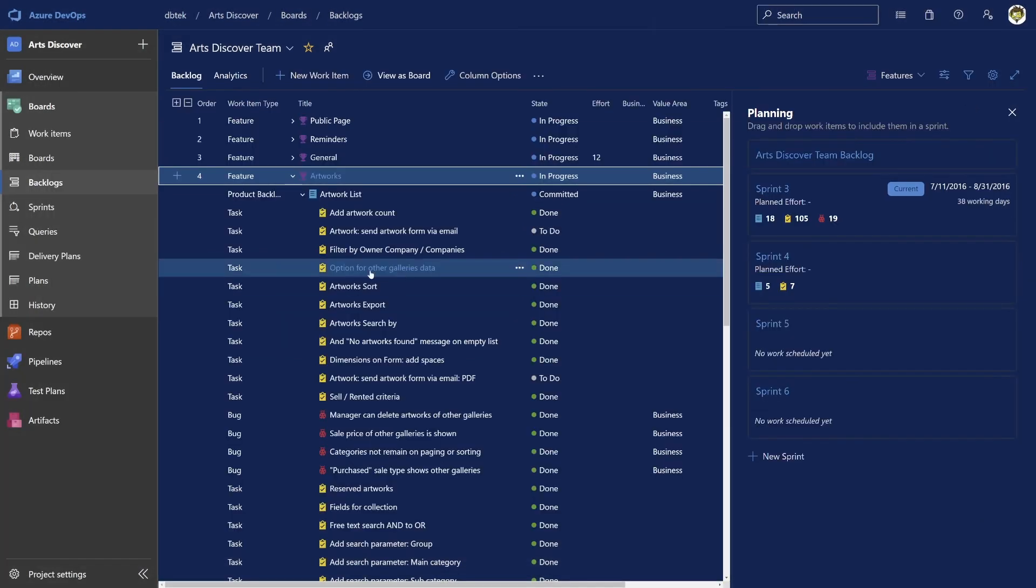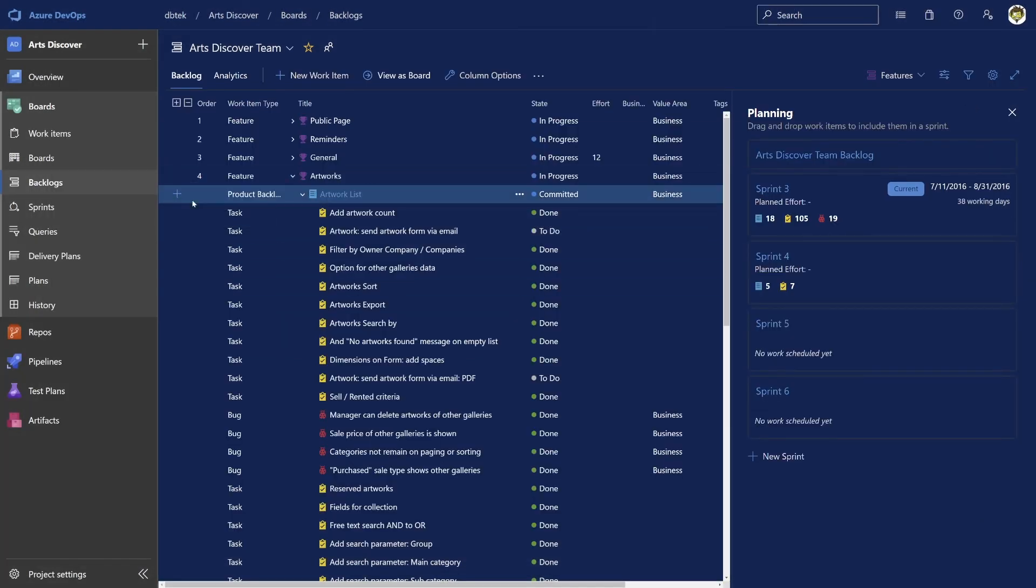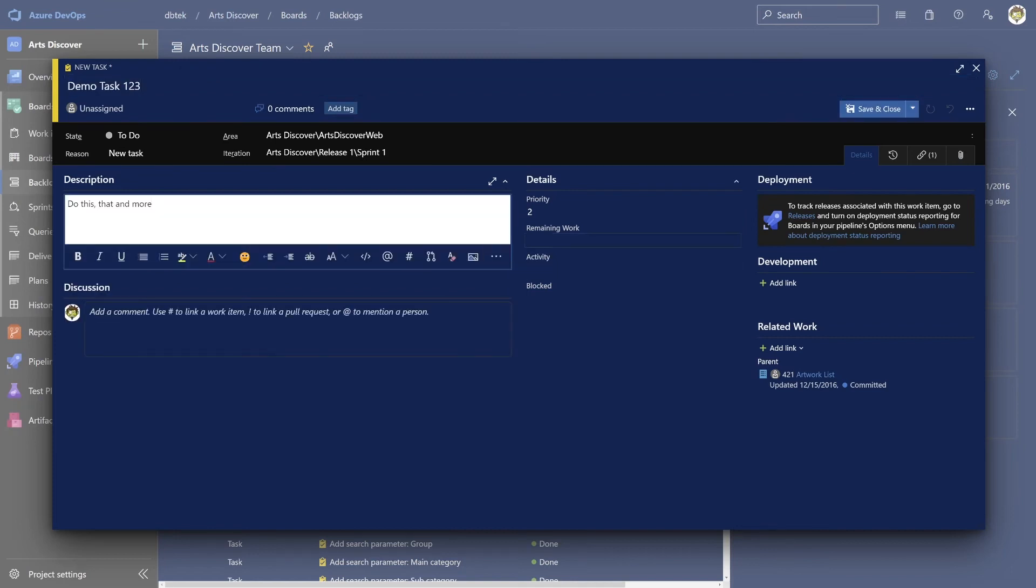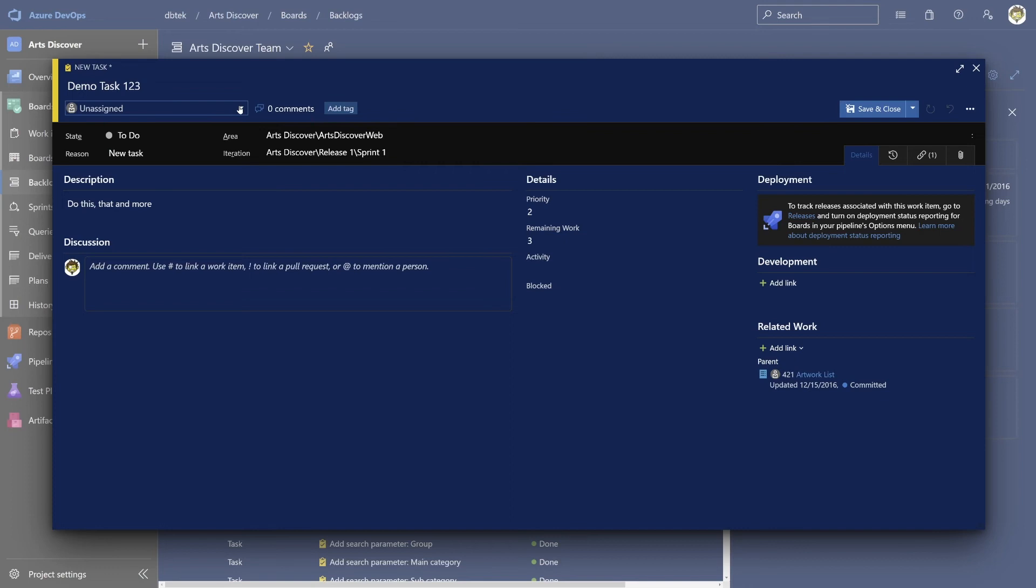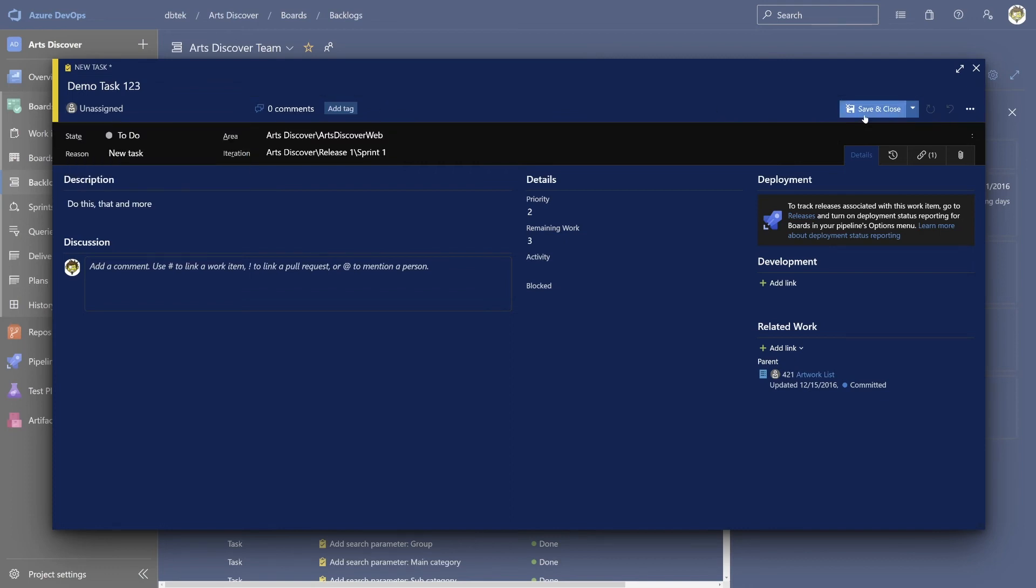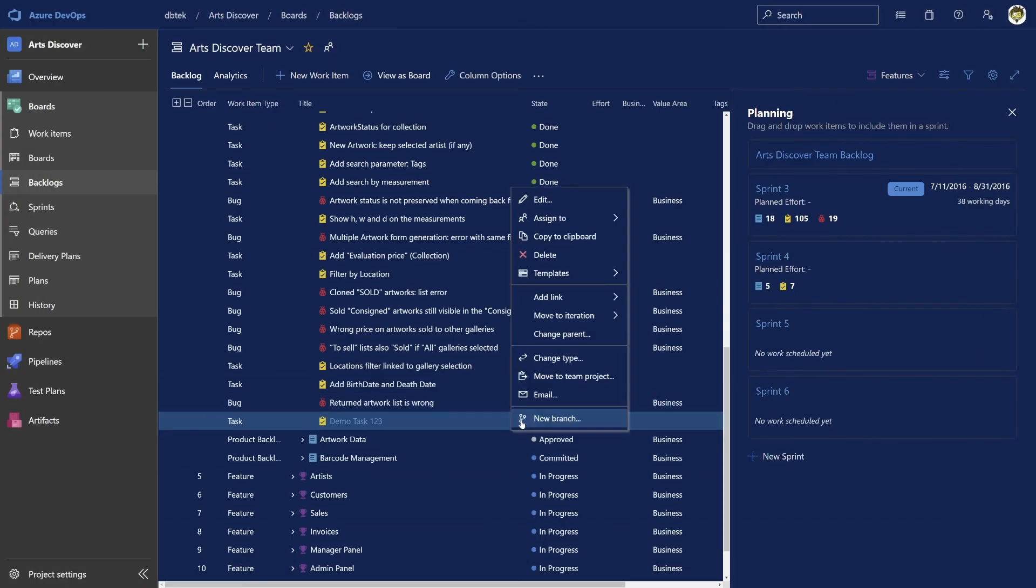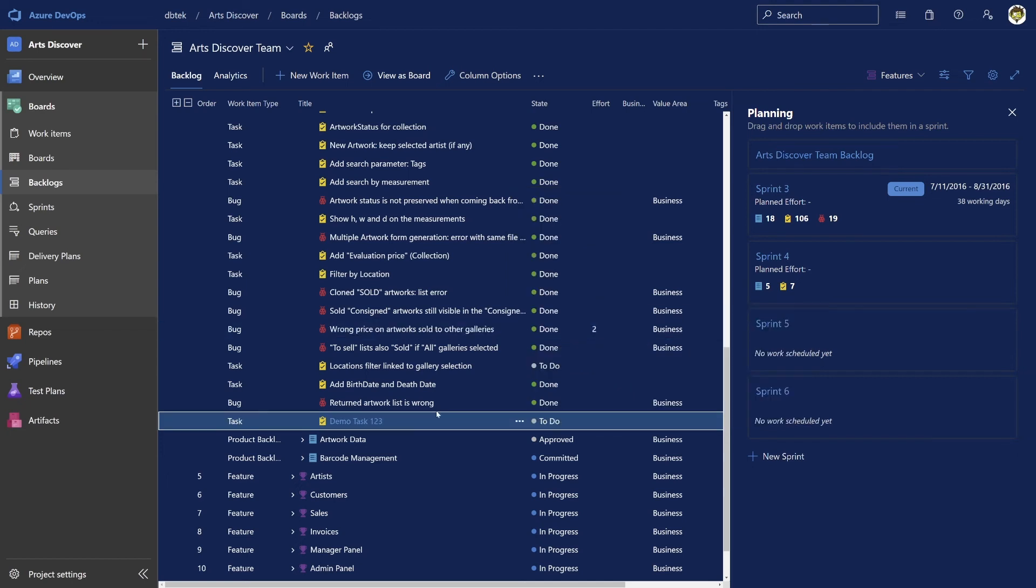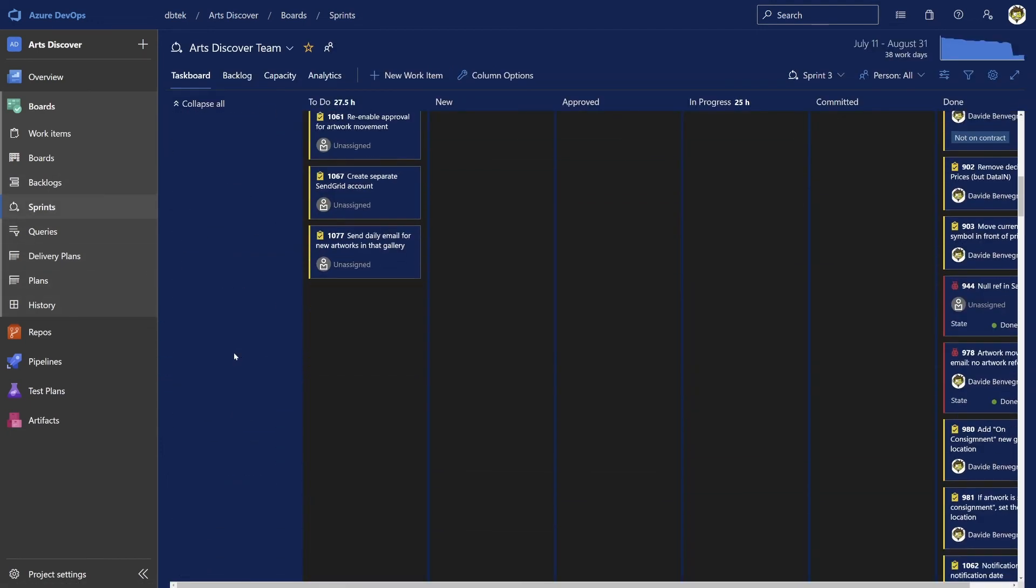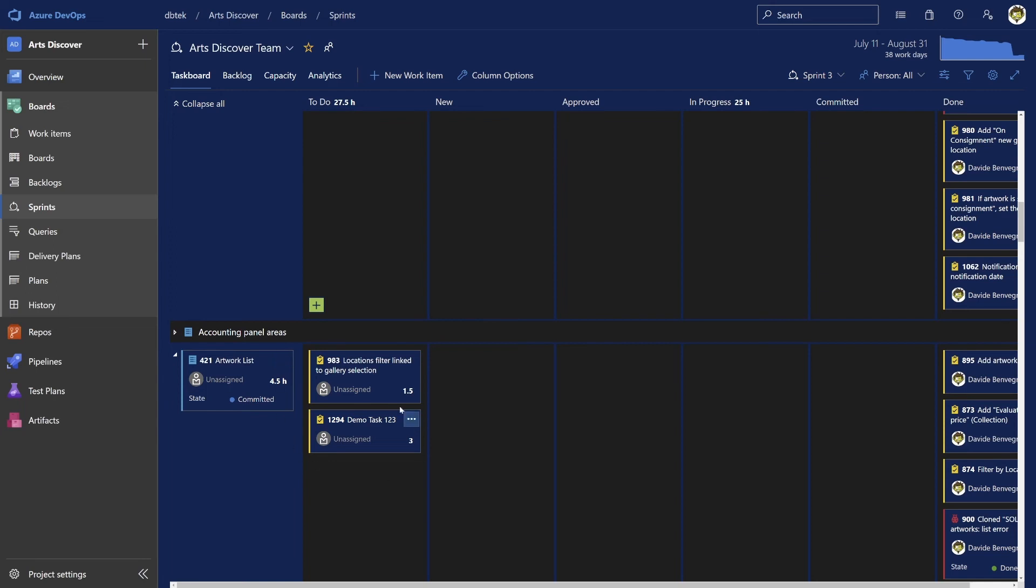Going back to our task, when creating it, we will need to insert all the information the person will need to execute it. And then we can assign the task to a specific person or let the team free to pick it up. Finally, we should assign the work item to an iteration or sprint so the team knows when to execute it. And since I've assigned it to the current sprint, I can go to the sprints tab and under my backlog item, I will now see the new task.